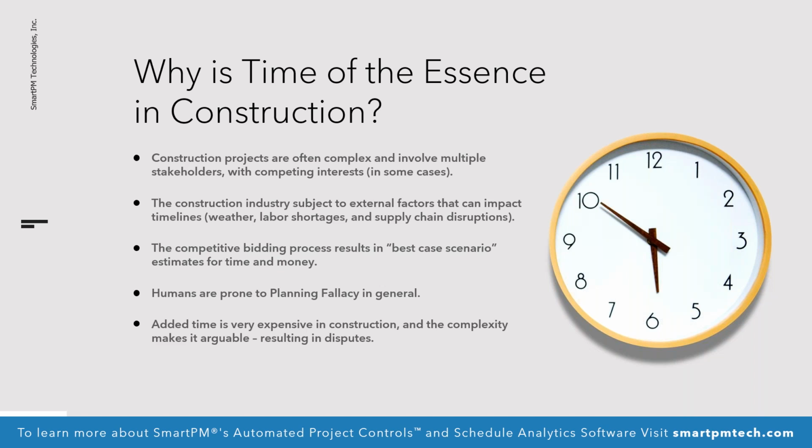Weather, labor shortages, supply chain disruptions are ones that we're seeing today. Escalated costs, all little things that affect budgets and timelines. The other thing is, in a lot of cases when we're looking at winning a job, most people are trying to come up with the best duration that they can possibly think of to get it done, and they're thinking a best case scenario. They're not necessarily intertwining risk into the equation.